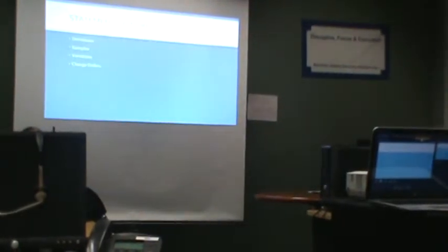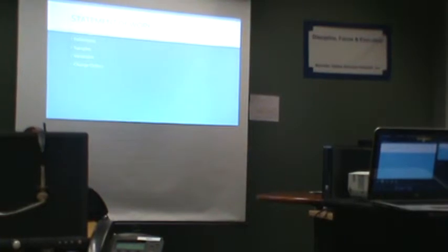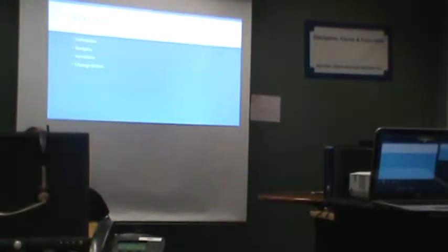To be able to do what you want us to do, we gotta go troubleshoot the network. You authorize us this time. Yes or no? No? Okay, I'm gonna have my guy leave. Let us know if you want us to come back. Yes? Great. Here's the change order. Please sign it. Once you get it back to me, I'll have my guy go do the work.